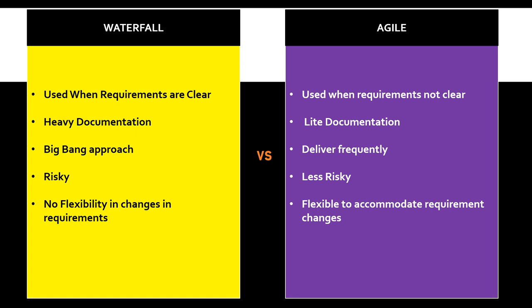Second difference: documentation. Waterfall is very heavy in documentation — BRD, FRD, Technical Specifications, detailed test plans, and test scripts. A lot of time is spent on documentation and review and sign-offs. Agile is very light in documentation — the main artifacts are the product backlog with epics and user stories, and the sprint backlog. Agile believes in conversation among team members rather than extensive documentation, which helps the team progress faster.